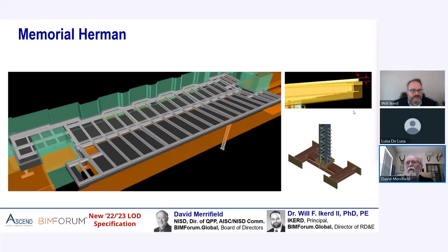What you're looking at there was in fact the overlay of the roofing supplier and the people making the fascia material. That was their model, and obviously we had to come together to be able to make the two match up. They were having their own problems, so that picture in the right corner there basically is showing a metal fascia system and roofing system that didn't fit the structural steel. So that also had to be taken into account, that all this needed to be prefabricated so that it could be erected and put in place fairly quickly.